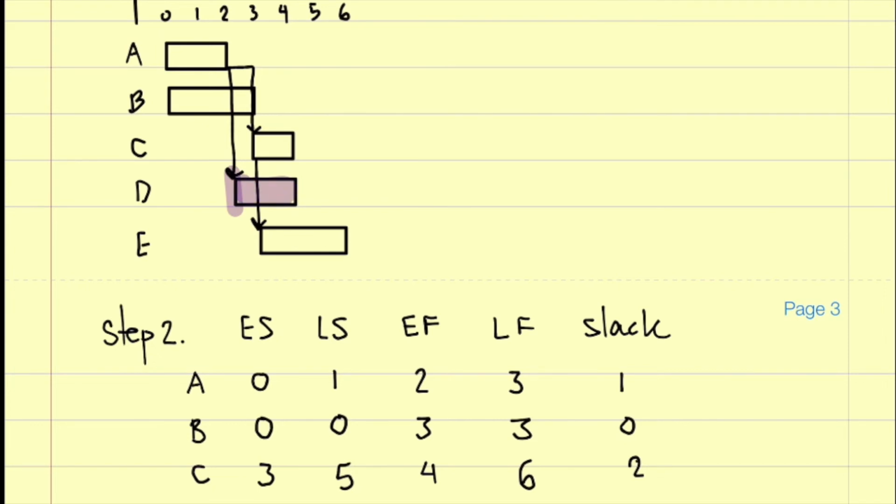4, because I can move it, I can slide it. Yes. 2 units, right? Just do it in your mind, okay? It's just like being on trucks. I can slide it 2 units and nothing happens, all right? So late start is 4. Please visualize it, okay? It's super important.